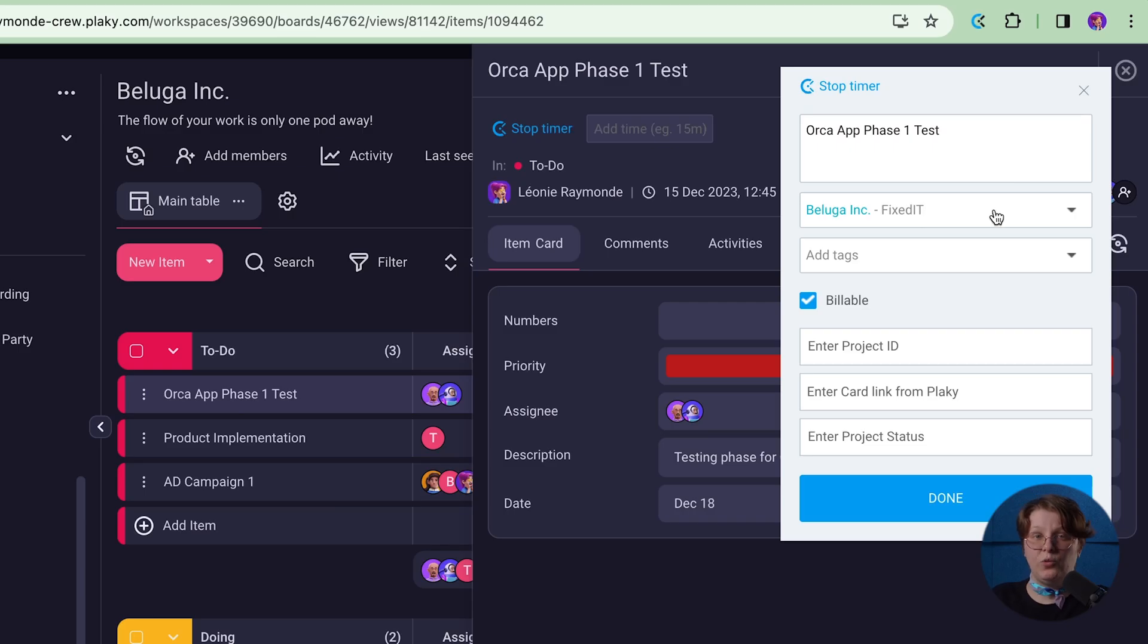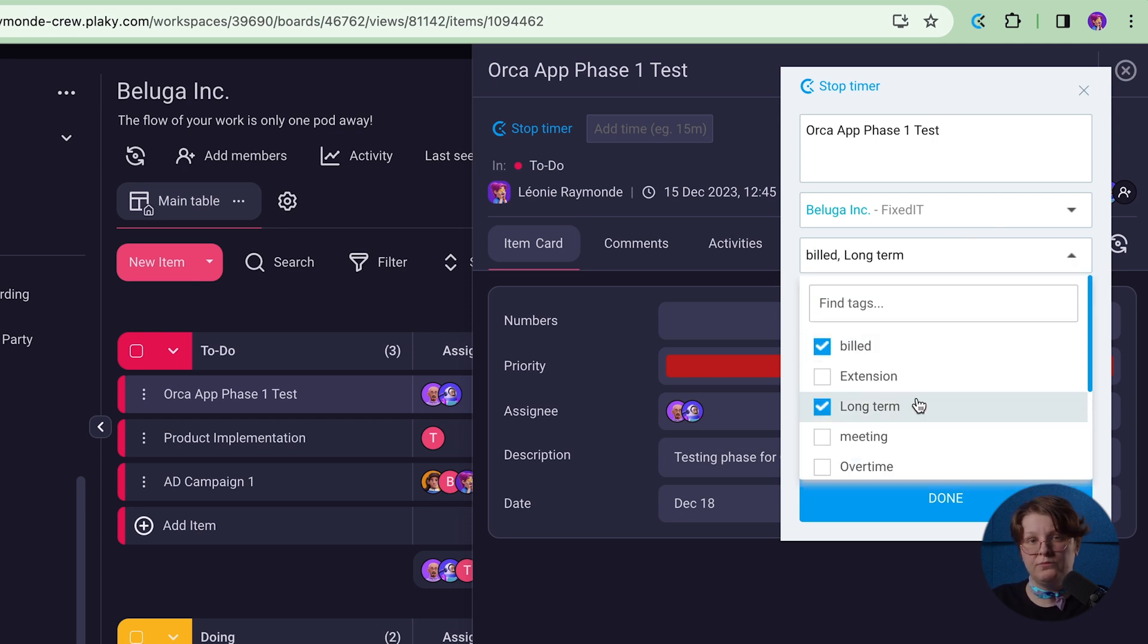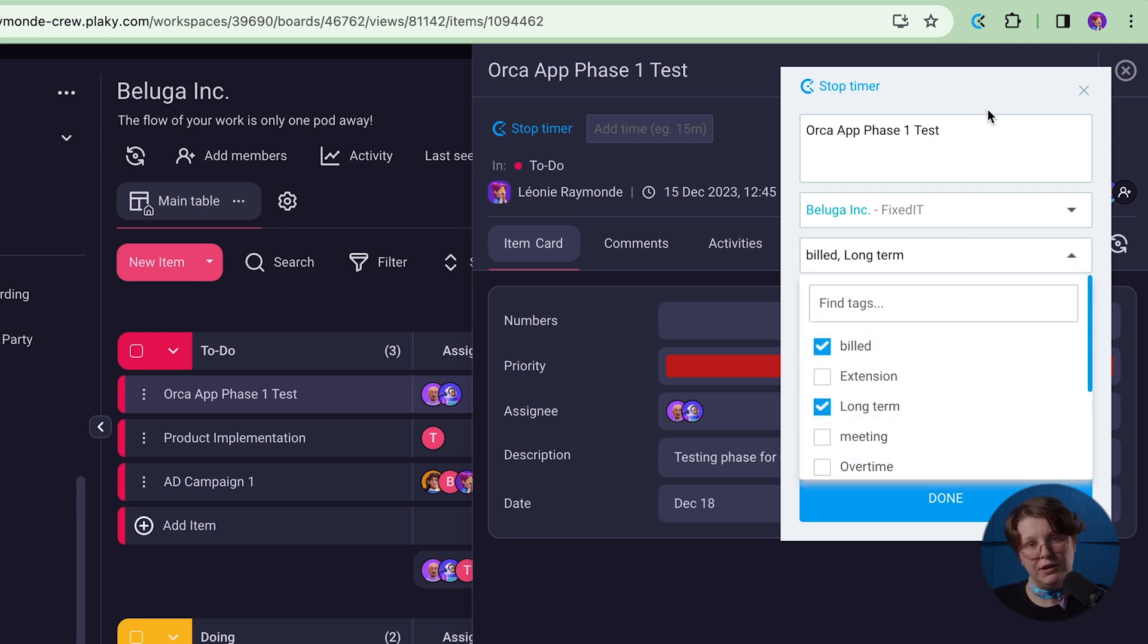The extension will automatically pick up your task name and you will see a pop-up to enter more details about the entry, project, description, tags, and billability.